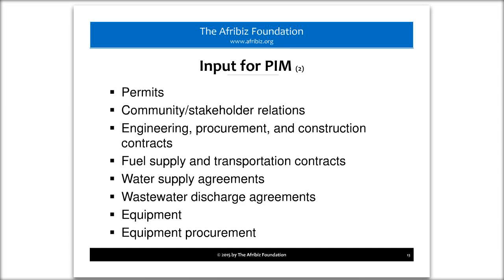So where it may seem, if you're in a country in Africa, that this isn't a major issue, it is when it comes to financing. This is a very good example of how, if you're not aware of all of these different factors, when you come to finance, you can find out that you have not been structured correctly to get the finance, even if overall your project looks feasible. And so it's very important, again, to keep track of all of these pieces.